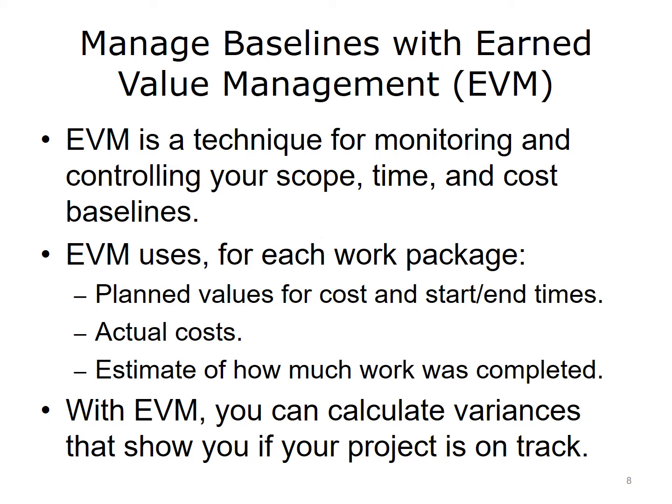Some of the needed values for EVM are easy to obtain. You will have task start and end dates from your project management plan. You will know estimated and actual costs. The difficult value to establish is the estimate of work completed. You'll have to establish a certain percentage and be conservative. People do tend to overestimate how much of a project is completed, and that assumption can have repercussions down the line. You would rather be early completing a project than realize too late that your project was running behind.